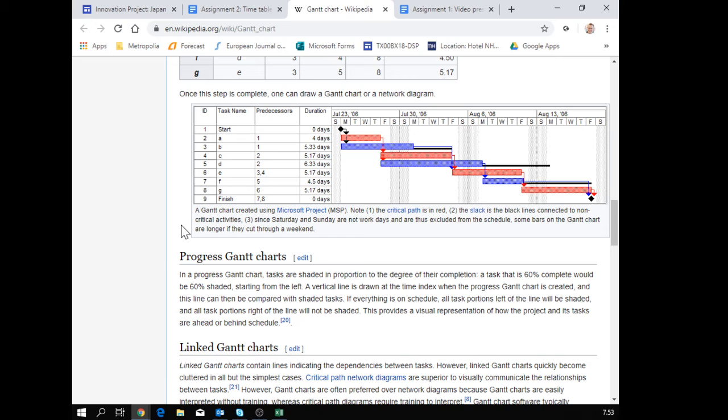Your task is now to go and fill the blocks: here you had the hardware design started, software design at the same time, maybe then the integration. At some point you would think about the box, but not yet. After the integration is done, you go to prototyping and back to design, either hardware or software.